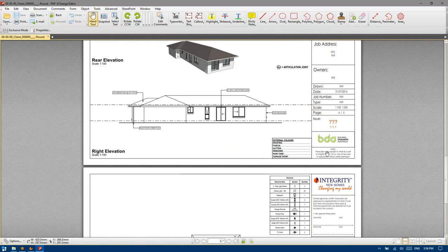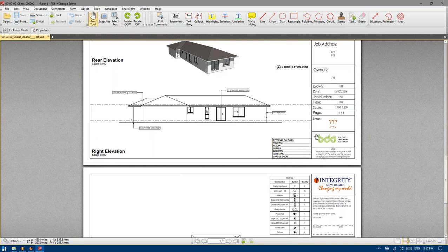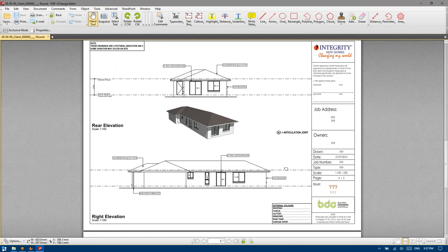So if the client signs these plans and it said the roof was a certain colour and it came out something entirely different, we could refer them to the construction set of plans that they endorsed with that colour stated, with a date more recent than any colour selection request or previous email or statement.